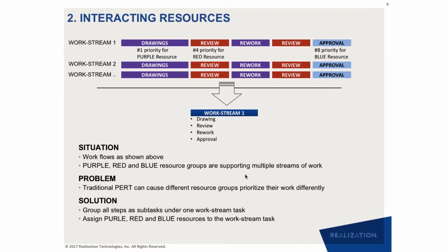Because when you have multi-resource tasks, then I know that someone has thought through the interactions and the interacting resources, and put them together. So whenever there is a task which is done by an individual resource, that is a red flag to say maybe the project plan is not good.